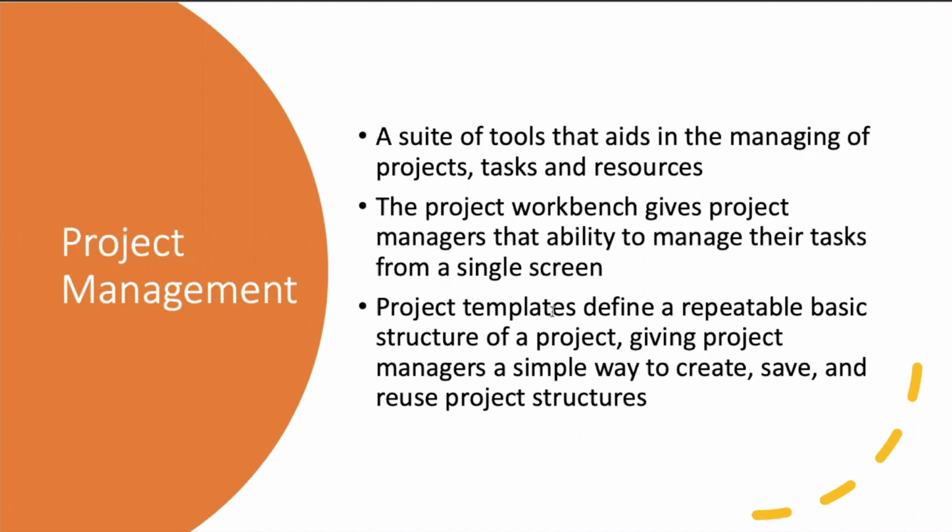And then they're told that, hey, well, you can do an import and export into Microsoft Project, and we can do an integration, when the reality is that ServiceNow only exports one type of schedule, and it has to be imported that exact same way. So it does become kind of a mess.